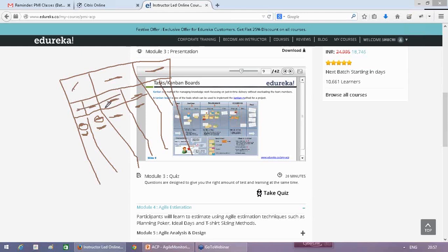In that case, the integration team would have a different Kanban board, a QA team would have a different one, and it's just not started, in progress and done. You can have multiple boards as well, but if you want to showcase everything in a single board, or if you have multiple teams, like a project which has a support team as well, it might become too chaotic. So you would want to track in different Kanban boards.